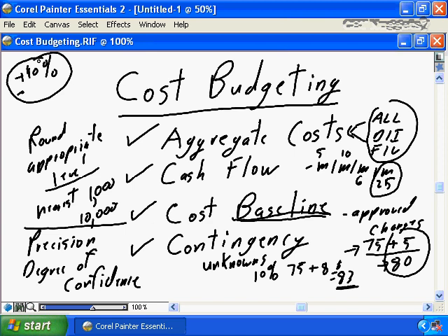If you think back to when we were doing time management, a rolling wave, that I have detailed estimates for each and every element of my project. Or is this a plus or minus 50%, that this is an initial project budget, I only have detailed estimates for the next phase of my project, which is the first of 5 phases, and I have summary level estimates for the remaining phases of my project.